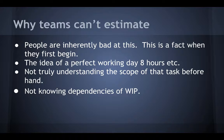Another tool is working day estimation. Let's be honest — only in a perfect world can all eight hours of a working day be spent on a single task. Meetings, reading emails, and miscellaneous personal and professional tasks eat up at least an hour or two on a good day. So define a working day as the actual hours you're available to work on a task. Generally, four to six hours a day is a full working day. Teach teams to use the bucket tool and the working day concept and you'll be able to have much more realistic time estimates to complete a task than ever before.